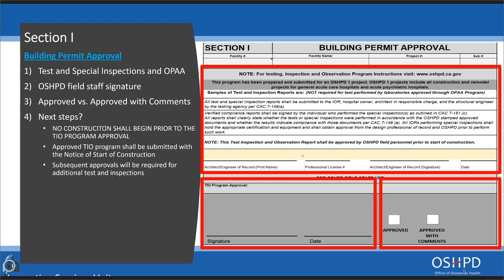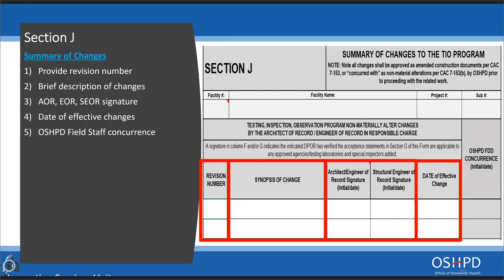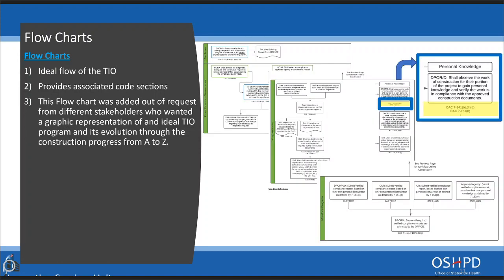Section J is the summary of changes. It provides a section for a revision number, a brief description of changes, and requires the architect of record, engineer of record, or structural engineer of record signature. It also has a box for the date of effective changes and a section for OSHPD concurrence. A new flowchart section has been added to the TIO, providing an ideal flow of the program and the associated code sections for every section, added at the request of stakeholders wanting a graphic representation.